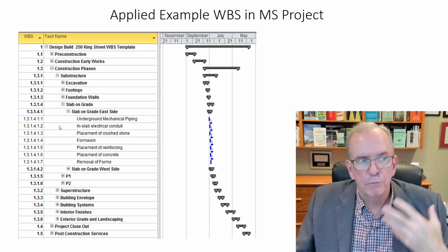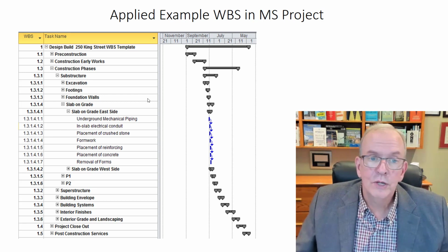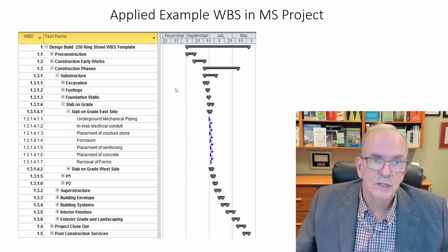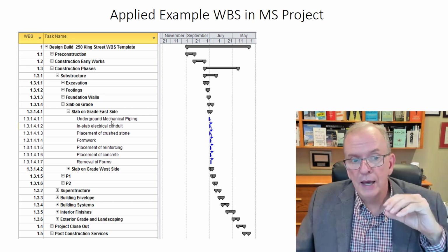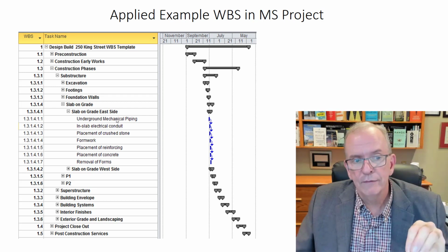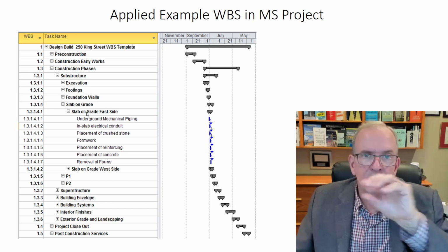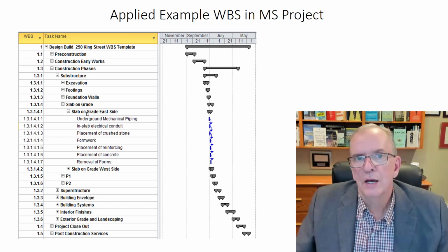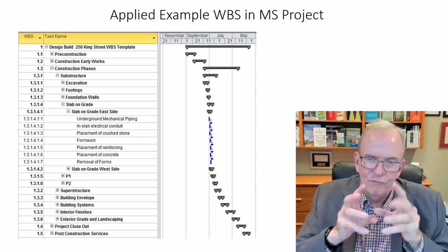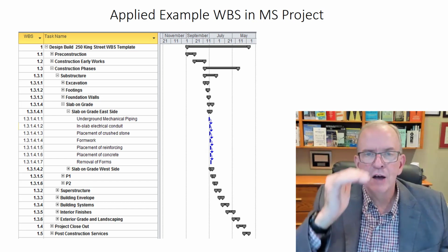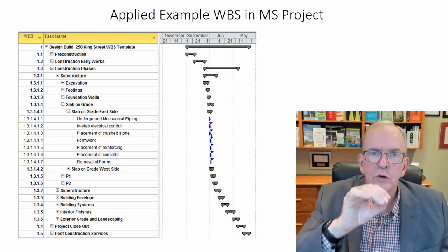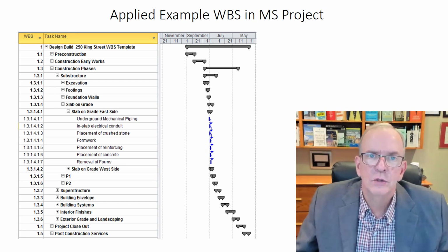So that's that breakdown. Now, as I said earlier, you can also assign account codes and you can assign costs to help track the information. Then you can look at it not only at the very granular level of the activity, but you can also look at your costs and how you're performing rolled up at different intermediate levels of work. Because sometimes it might be too granular for you to see how you're actually doing overall, and you want to roll it up to different levels of headings to monitor what's going on.